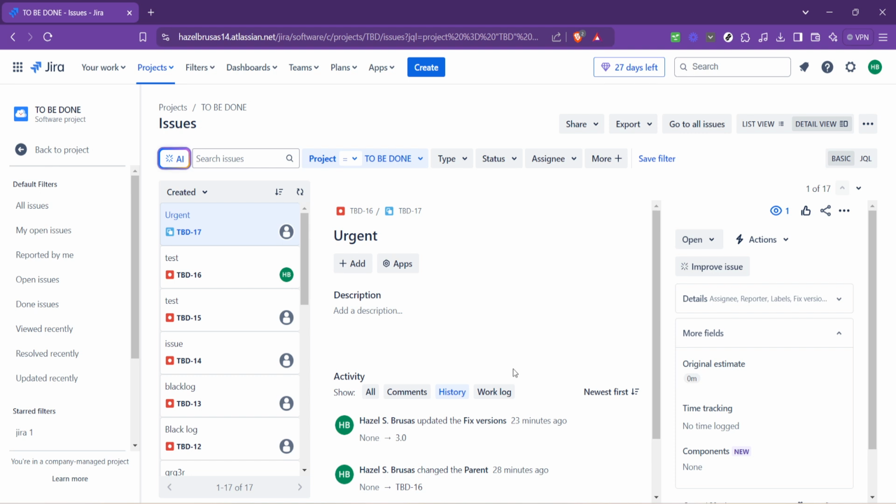While reviewing the history, it's beneficial to take your time to understand the context behind each change. For instance, if an issue has been reassigned multiple times, it might indicate a problem in task clarity or difficulty. Similarly, frequent status changes might reveal bottlenecks in your workflow.